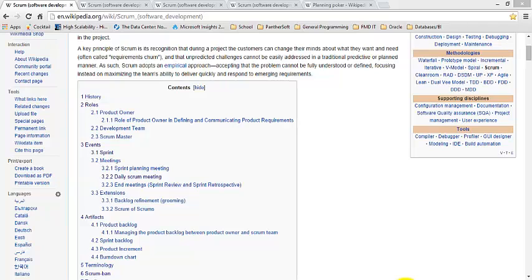You also have a backlog, whether we call it a product backlog or a sprint backlog. It is a list of features that need to get implemented, and this backlog is made mostly of user stories, stories basically from the customer. It is basically what the customer feels should go into the product, but not all stories make it to the backlog, and not all stories then become worked on during the sprints.